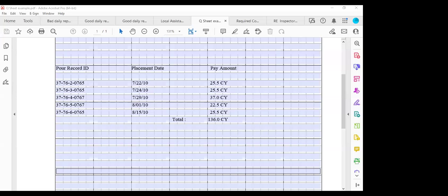But in the diary, he can break it down by day and still submit it on a weekly basis, completing it weekly with every day broken down. It doesn't have to be on a daily basis for the resident engineer on smaller projects, but I would recommend daily. But sometimes we understand there is a staffing shortage, and some resident engineers are also covering inspectors' work and other activities. In that case, weekly could be accepted.